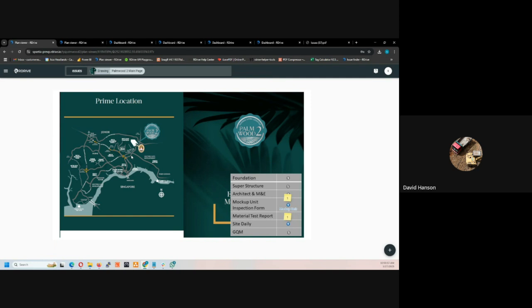And you've made this change a year into the project, where there's been a number of inspections and issues. When I replace the drawing, I replace the drawing at a substrate, so all of the locations, all of the issues and inspections are still going to be in place, even though I've removed the drawing. If I replace the drawing, I'm not going to be affecting any of the issues or inspections.